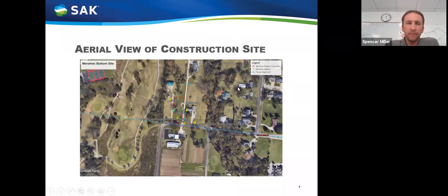An aerial view here, as you can see, the red rectangle area is the location in the middle of the line there. I apologize for not zooming in further, but that is the site that we will be occupying for this project. St. Louis County Parks actually owns this site. So the turquoise alignment, that dotted line through there, that is the tunnel alignment. There's a pin that's about a 1/4 inch away from that alignment. That's where the drop shaft will be drilled. Drill that drop shaft down to tunnel elevation, and then we will come in from the tunnel side and we will blast from the tunnel side over to the shaft itself.